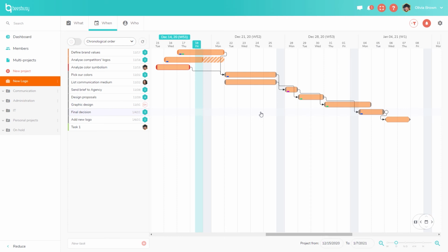You can also see that I have added a milestone here. The task has taken the shape of 2 arrows on the side. I talked earlier about the milestone task. So the milestone task is a deadline within your project. It's a task that cannot be moved if you move any other linked task.